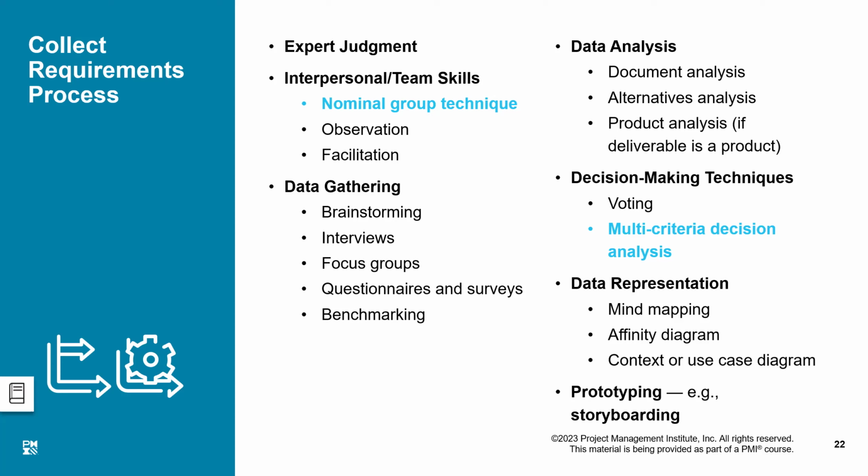Maybe there were 3 parameters on which I am asking opinion, but one of the parameters is very important, right? That is given 3 times more weightage than the other 2 areas, right? So that means 1 time weightage to the other areas and 3 times weightage to this area. So that way, what is going to be the multi-criteria decision analysis? My output would be a, what do you call it? Weighted average. Have you ever heard about a weighted average?